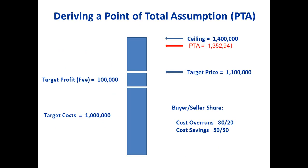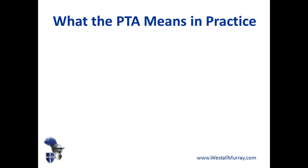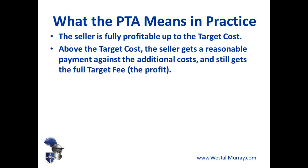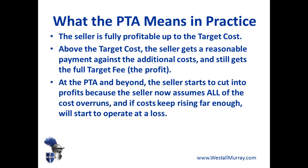The point of total assumption in this example is one million three hundred and fifty-two thousand nine hundred and forty-one dollars. What does that mean? Up to the target cost, the seller is fully profitable. Above the target cost — if costs go above a million in our example — the seller gets reasonable payment against additional costs and still receives their full target fee of one hundred thousand. However, at the point of total assumption and beyond, the seller has to pay all of the cost overruns and therefore starts to cut into their profits. If costs keep rising far enough, they'll start to operate at a loss.